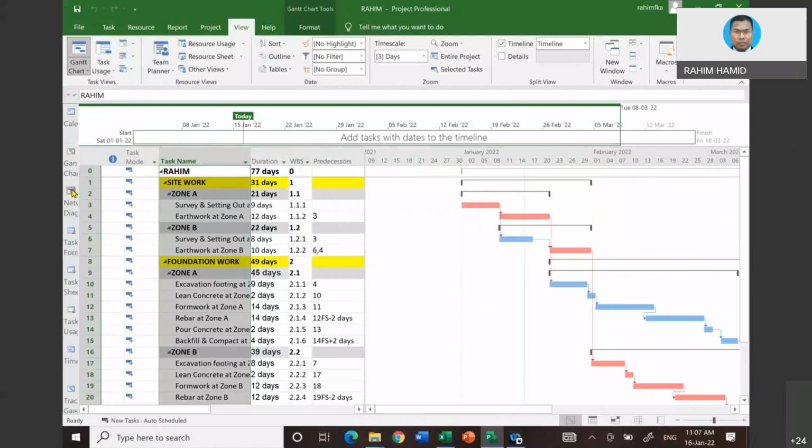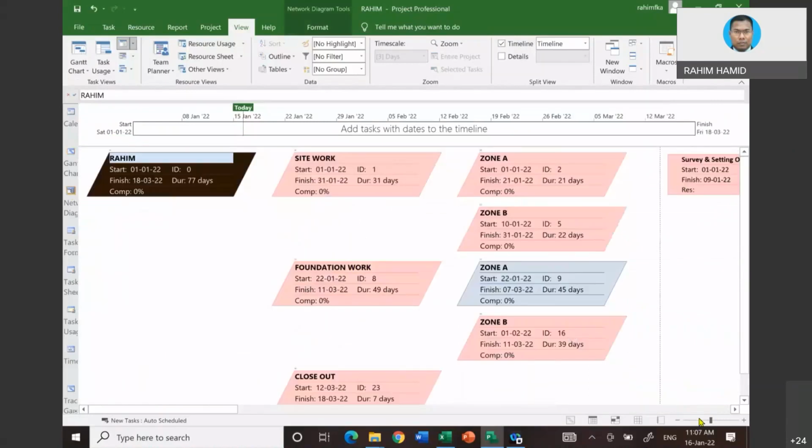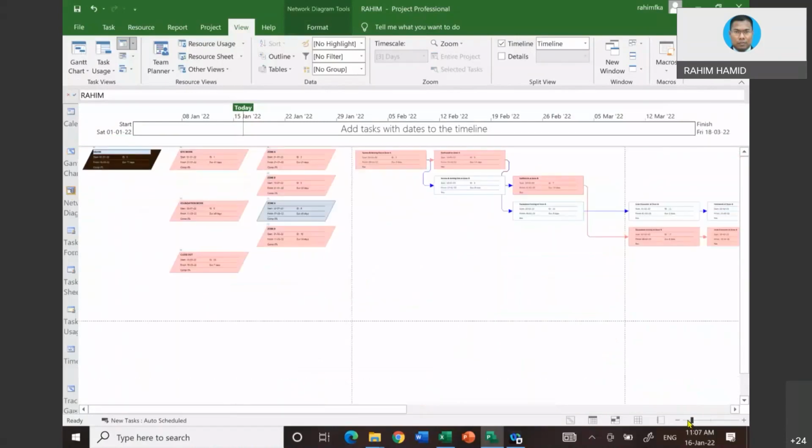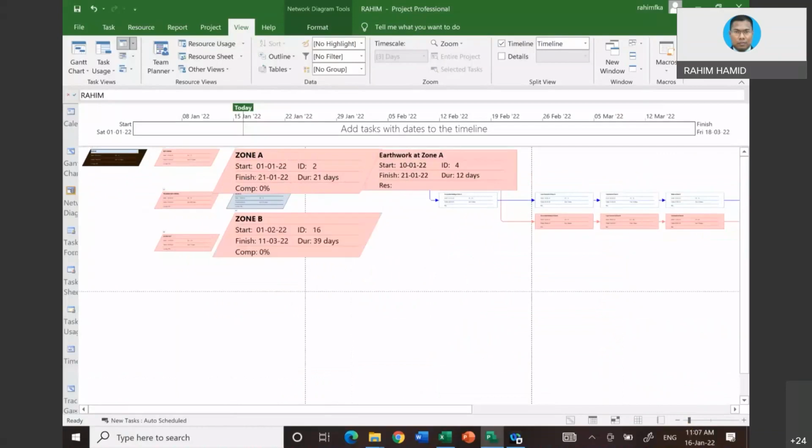This is the button. You can see, make it smaller so that we can see here. You notice that the one in square box indicates activity, all the activity, and the one in red indicates the critical activities, and the one with this kind of shape box is not an activity, it is just the summary task. So don't get confused. That's why they are not connected. The connected ones are the activities. We only connect between activities.